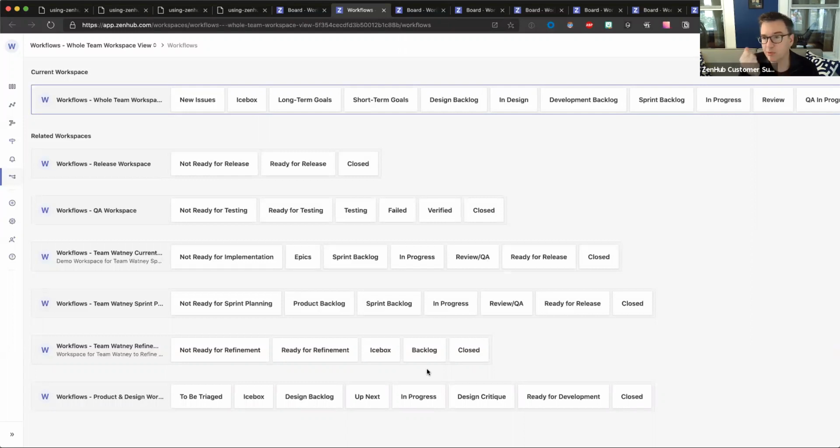Yes. If so, we put it in the backlog. And at that point, that's refinement, right? It's the coming to an agreement that the team understands the body of work and that there's an agreement upon an estimate or how much effort is involved, right?